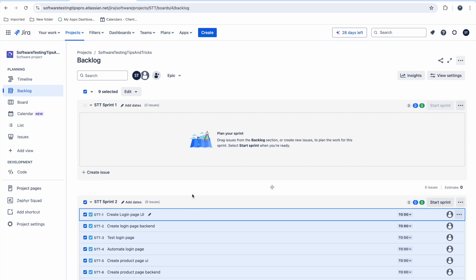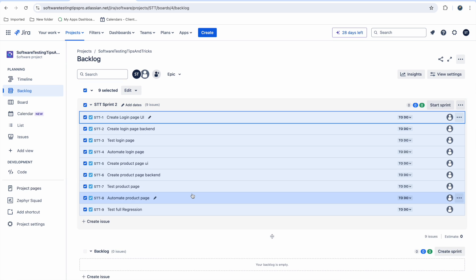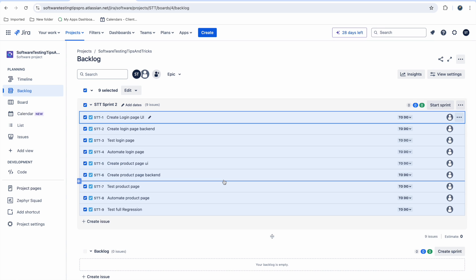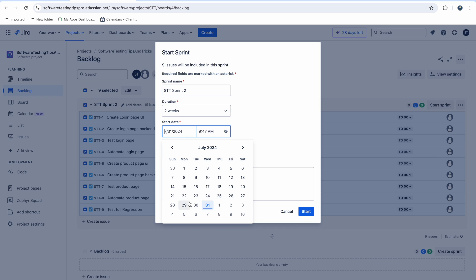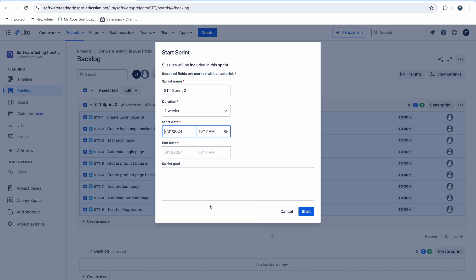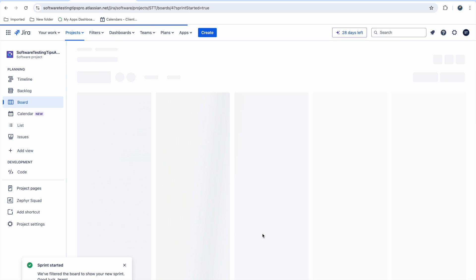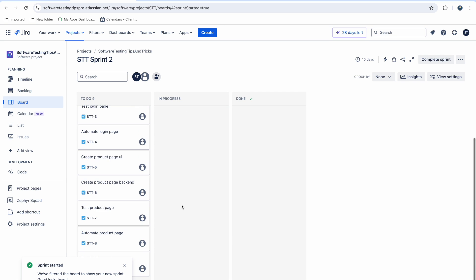For those who don't know, in Agile we divide the timeline into sprints. Some companies follow one week, some two weeks, some four weeks. Each sprint we decide what tasks we want to complete — the entire project is divided into sprints. I am naming this a two-week sprint, setting today as the start date, which automatically sets the end date two weeks out, and adding a goal for what we want to achieve. Now my sprint is started and all the issues are visible.